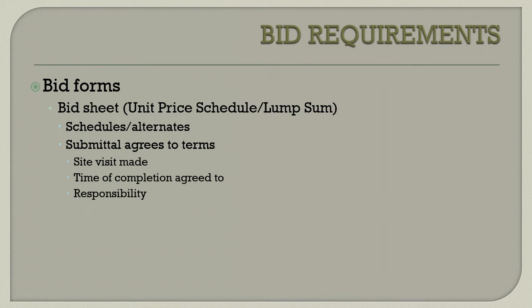When you submit the bid sheet, submitting it is agreeing to the various terms. That, let's say you did make a site visit, that the time for completion of the project you are agreeing to, that you have the wherewithal, the responsibility to complete this project. You will also submit bonds, and we'll talk about what those are. And then there might be other submittals that you have to make at that time, such as insurance or disadvantaged business enterprise work that is being done.